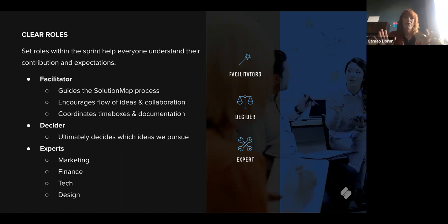The thing we're trying to solve for here is that kind of classic siloed effect that happens in organizations where a group of people make a good decision and then that's undercut later by a bunch of second guessers. We want to make sure that the team has the authority from their parent organization to be actually the true sponsors of this project, because otherwise, for one thing, why would we do this anyway? And why would we as an organization be committing to scope and timeline if that person who was making those decisions in real time doesn't have that authority?